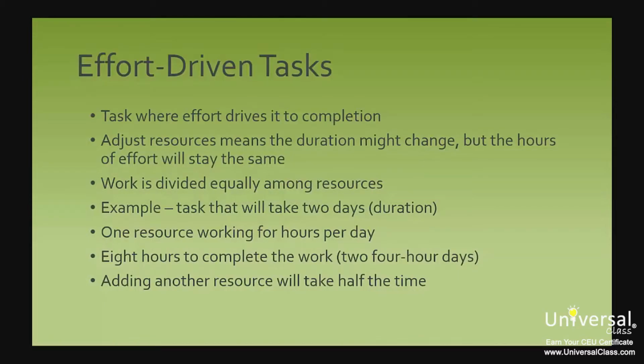An effort-driven task means that it is a task where effort drives it to completion. If you adjust resources or people or things used to accomplish a task, the duration of your task might change, but the hours of effort or work will stay the same. Whenever you add or delete resources on an effort-driven task, the work is divided equally among those resources. Later in this course, we're going to learn all about resources, so don't worry about knowing anything about them now.